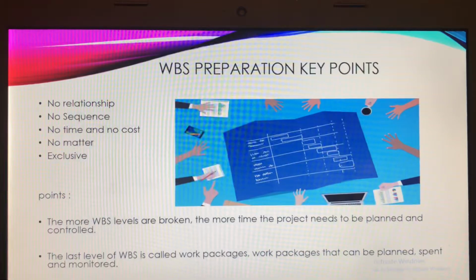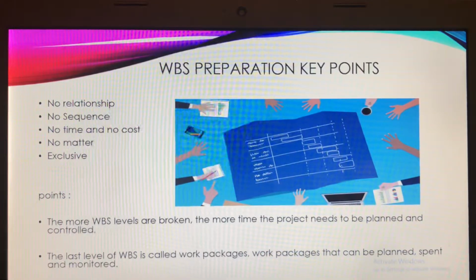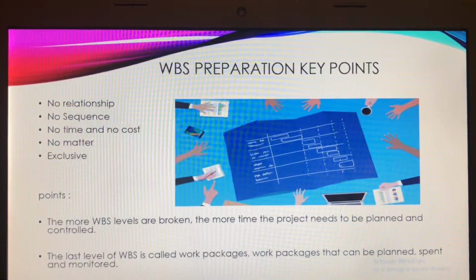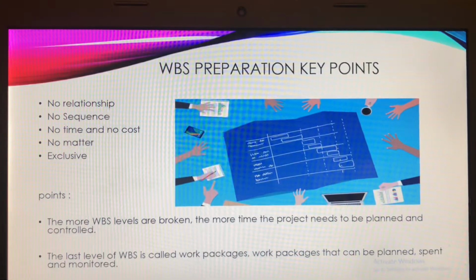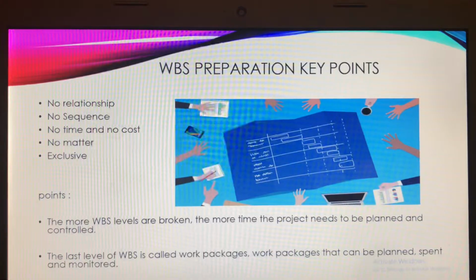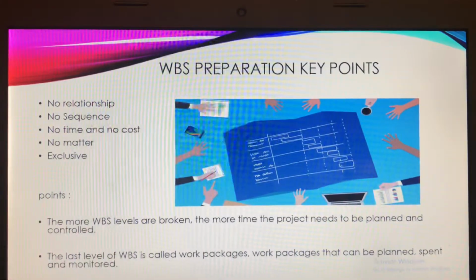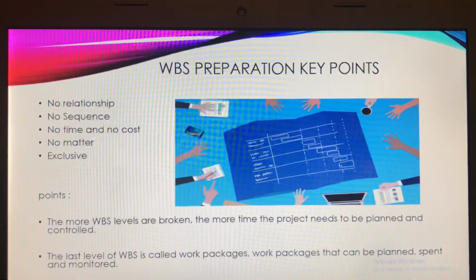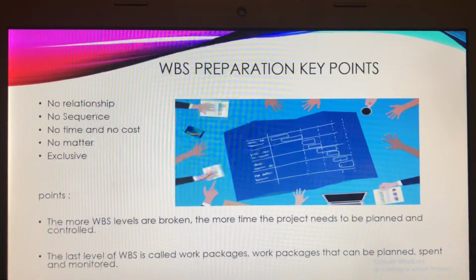The more WBS levels are broken down, the more time the project planning and control require. The last level of WBS is called a work package, a work package that can be scheduled, costed, and monitored.